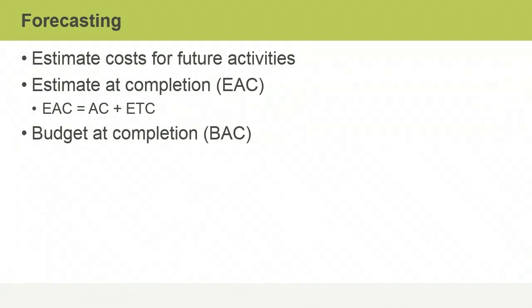It's important to determine a project's EAC because this gives you a more realistic idea of future project performance than the BAC. The EAC can help you identify areas where tighter cost control might be necessary based on how you know a project is likely to perform instead of on how you planned it should perform at the outset.